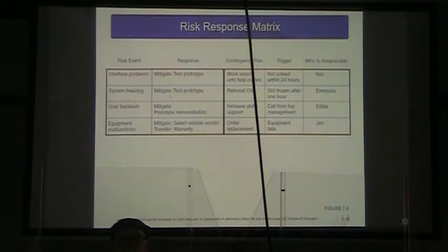System freezing, mitigate, again, is test the prototype. Our contingency plan is we'll reinstall the operating system. I don't think there's anyone here that hasn't had problems with their computer freezing up or not working properly.